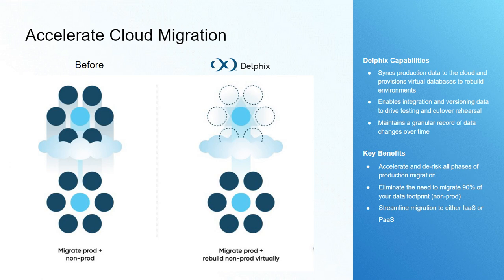When you do start migrating workloads, I have found that it's often easier to start the migration with non-critical environments. This is where development usually happens, and getting this into the cloud first allows you to explore cloud-native features while working out other details of the migration.